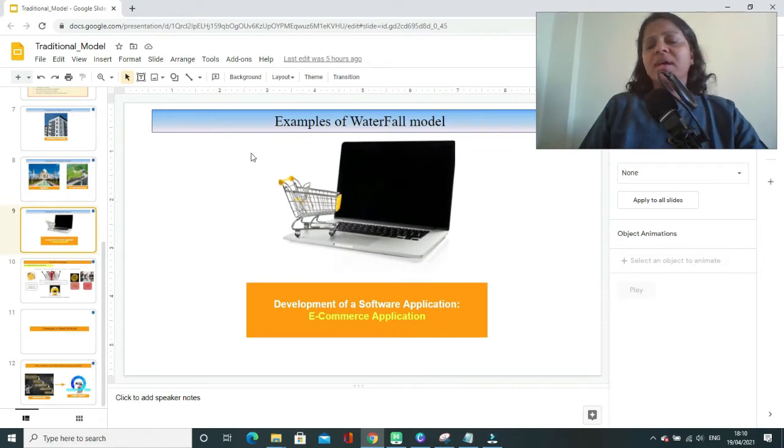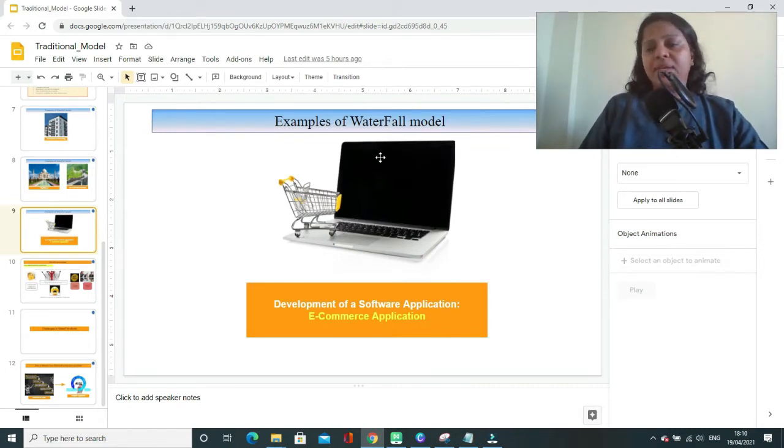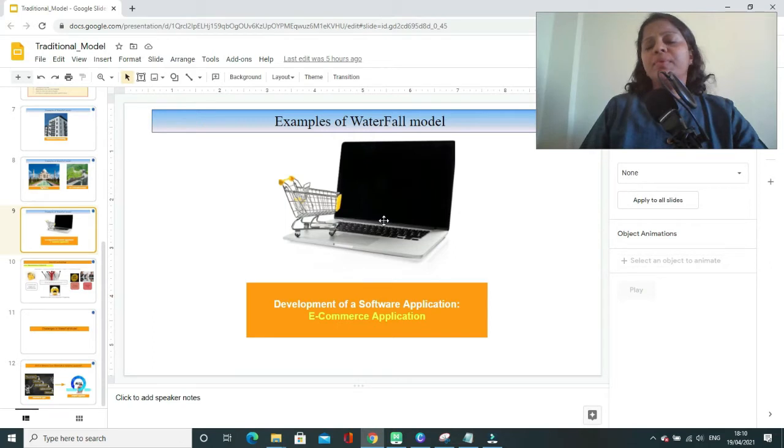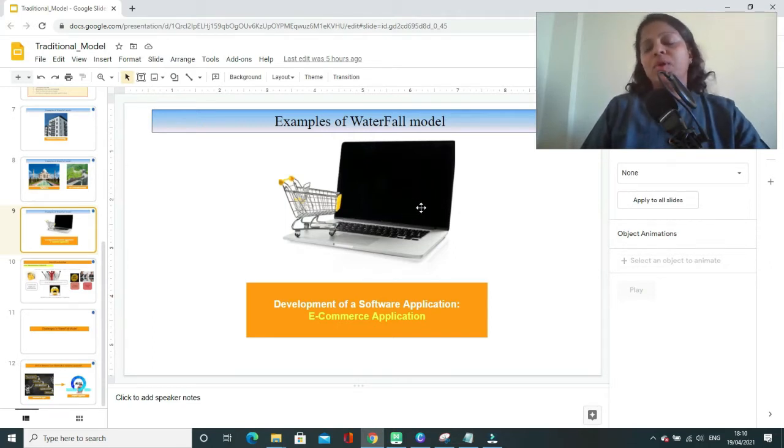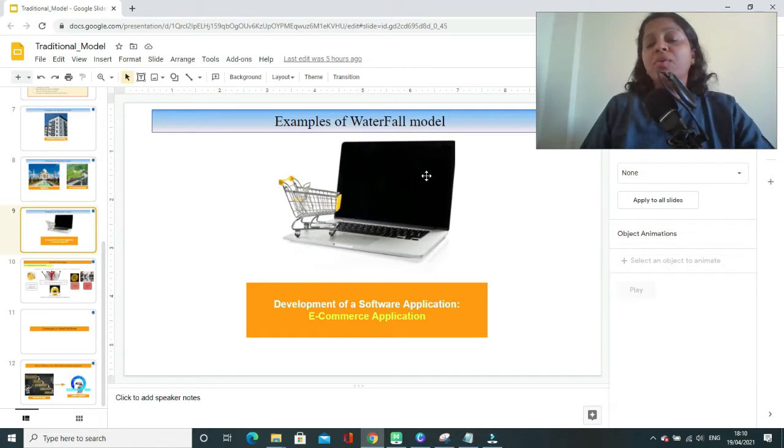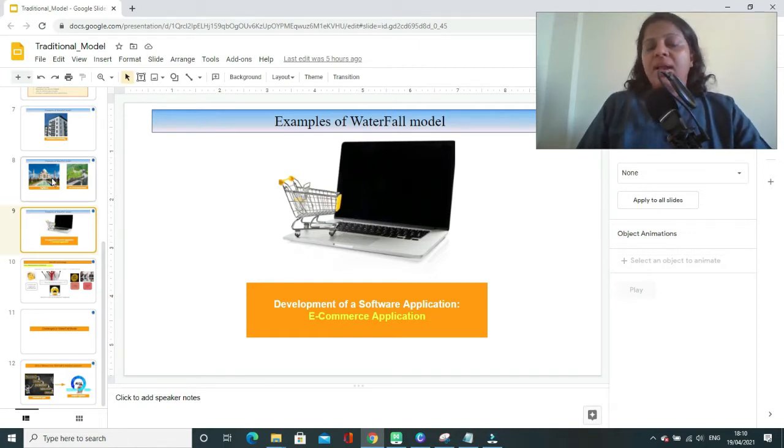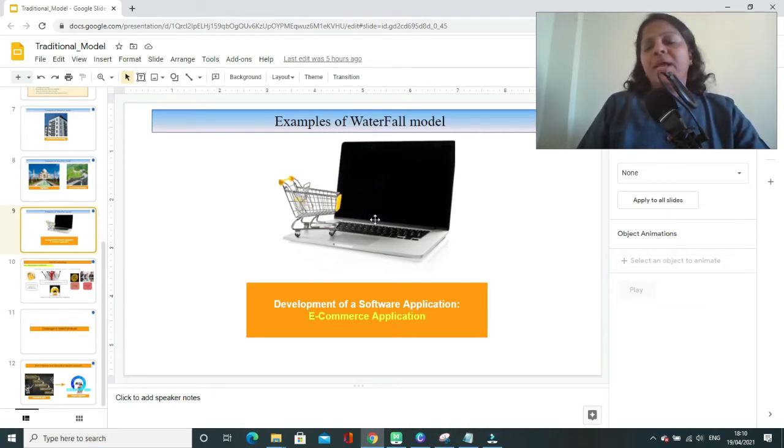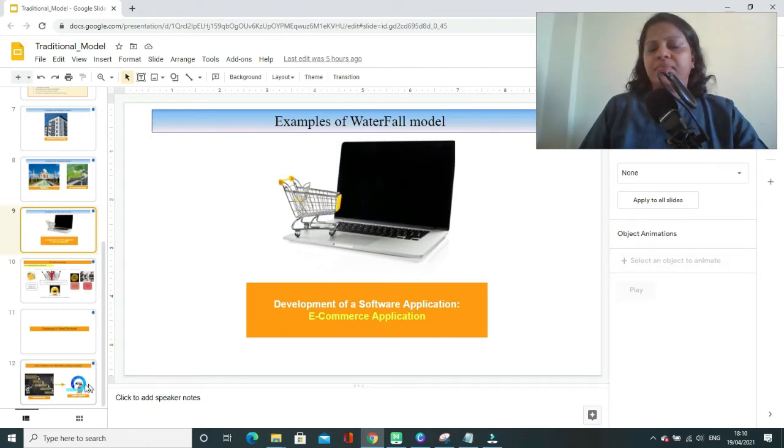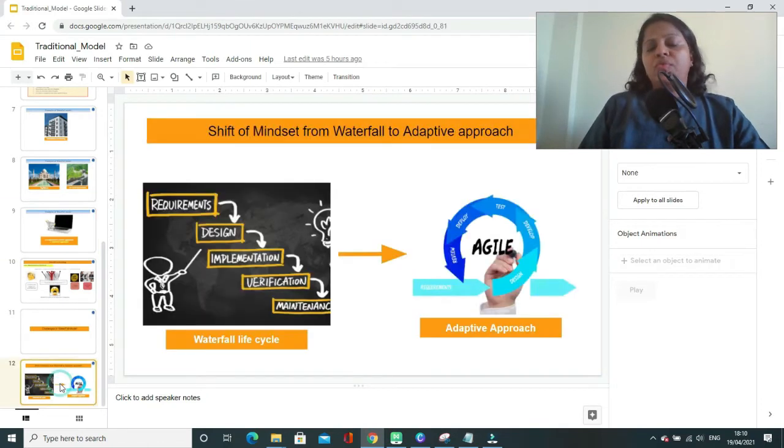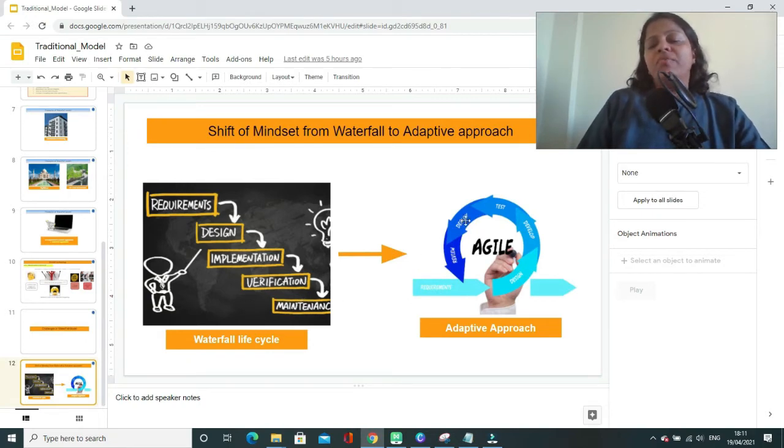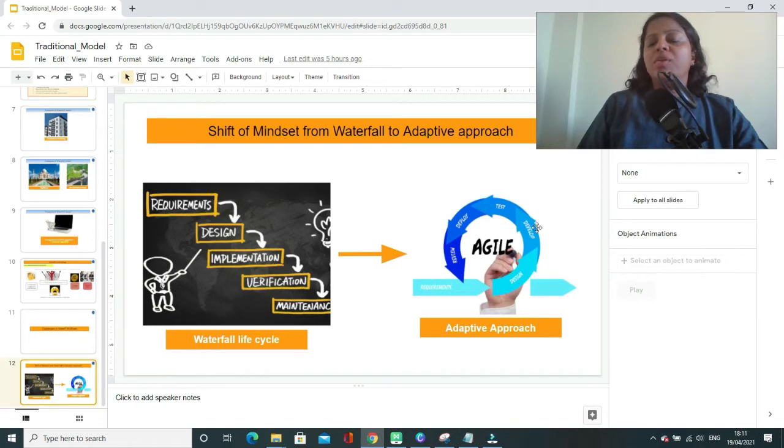to construct an application like e-commerce application using waterfall model, you will not be able to deliver the product with all the required functionality in one go and you might not be able to meet all the customers expectations. There are certain challenges you might face if you try to apply waterfall model to such projects. So for these kind of projects, instead of going with linear sequential model, we will have to think of adopting agile life cycle or adaptive life cycle.